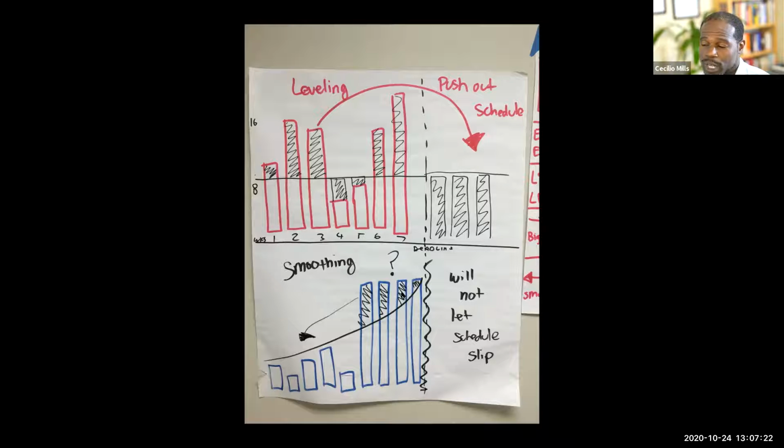So they ask first, can we do some of the stuff up front? Can we test some of the stuff as you build in the beginning? But if not, then you're going to have maybe 2 or 3 8-hour shifts to combat what you need in order to hit the schedule. Smoothing isn't going to push it out, so in this case you just double up, triple up, use additional resources.